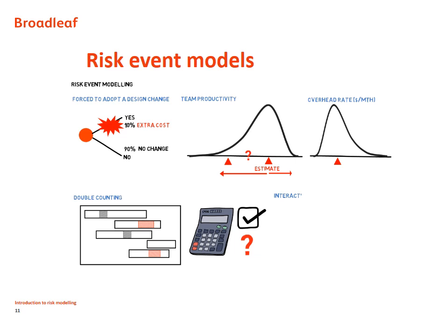The other challenge with risk event-based models is interactions between uncertainties. If we have a risk of a delay, we can calculate its impact in terms of the delay duration and the running rate of the overheads. If we have separately a risk of needing more people on the project management team, perhaps because of unexpected complexity, we can calculate its impact in terms of the team size increase, the overall project duration, and the baseline running rate of overheads.